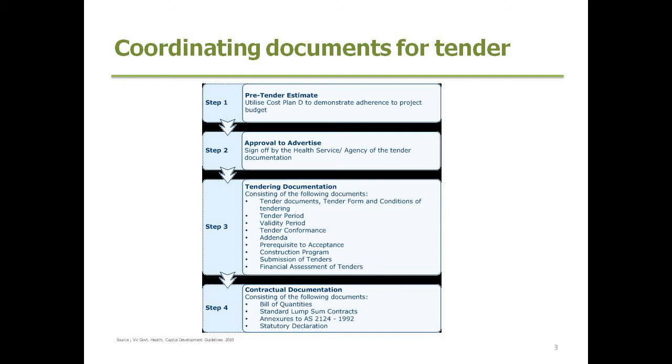Blank tender forms completed, copies of schedules of rates, and relevant information as well that's particular to the site. Bills of quantities and pricing of instructions and tenderers as well. So the flow of the information in that tender documentation, it's really important, and that's another critical part of communicating back out to the builder and contractor and supplier, and then communicating back to you exactly what it is that's required. They've actually understood exactly what it is and priced it and given it the resource and time that you require to get the project up and running.